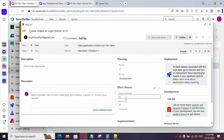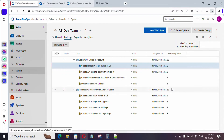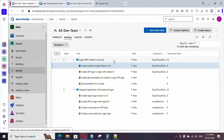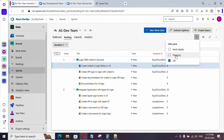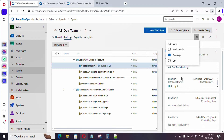For each user story the original estimate is set to 8 hours. Ideally you should split tasks so each can be completed in a day. If a task cannot be completed in one day, split it and create more tasks. There are four tasks each with an estimate of 8 hours, which is why the total shows 32. Similarly for the other user story. Click on View Options and then Planning to see the same panel we saw in the backlog.